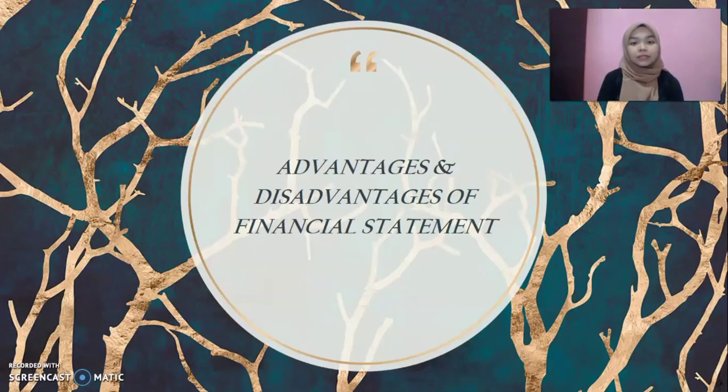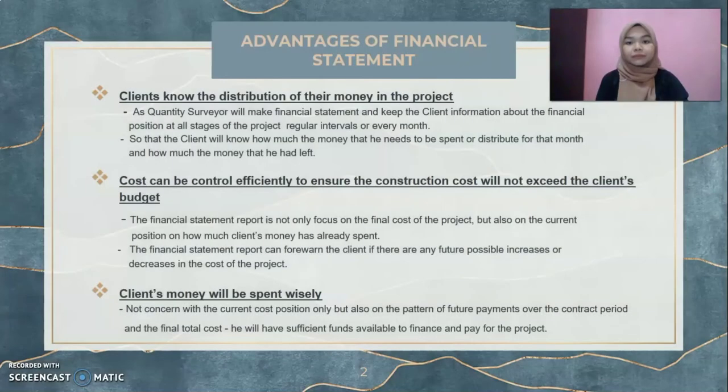Next are the advantages and disadvantages of the financial statement. One of the advantages is that the client knows the distribution of their money in the project. The QS will make the financial statement and keep the client informed about the financial position at all stages of the project, so that the client will know how much money needs to be spent or distributed for that month and how much money he has left.